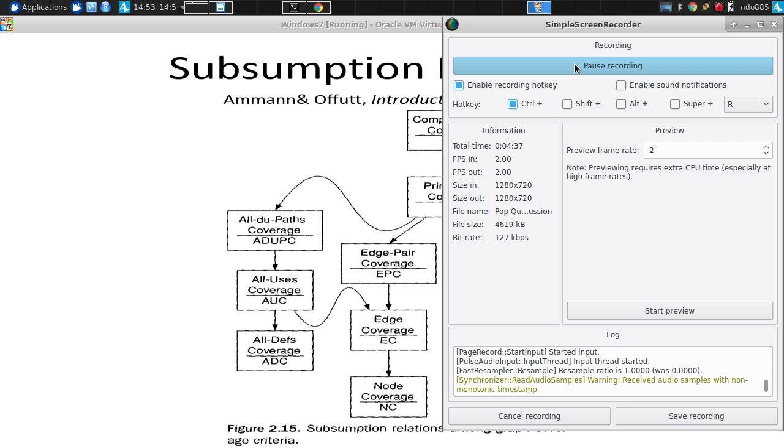So mitigation lowers risk exposure. It does it in one of two ways: lowering the probability of it occurring, or lowering the impact if it does occur, or both. Okay? So that's what mitigation does. It undertakes actions now to accomplish one of those things. In contrast to contingency planning, which is really an exercise of being all prepared to undertake actions if the risk materializes, to coordinate effectively so we're all on the same page if this risk comes about. Okay.